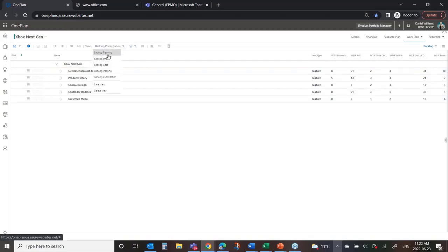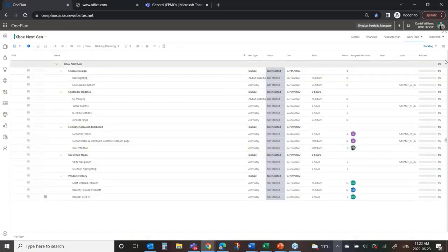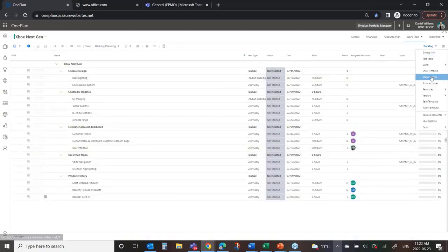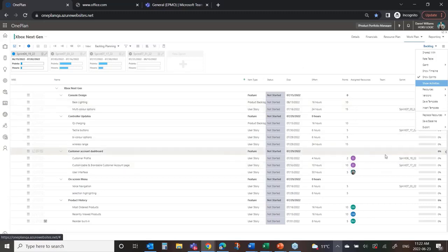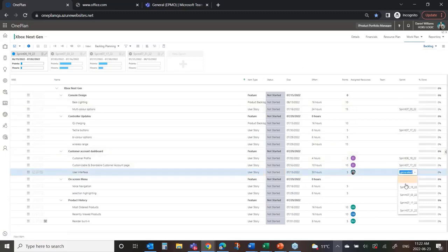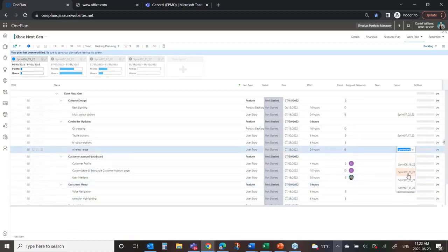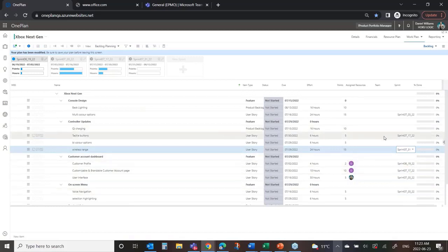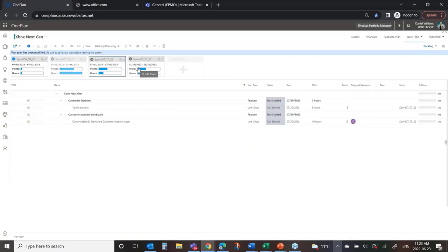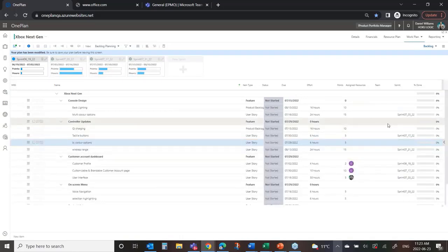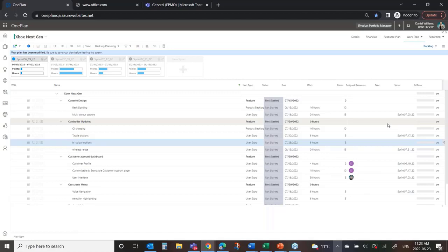So back to my planning, I can now look at all of those capabilities. I'm going to just show my sprints on here. And now I want to plan at the very tactical level, how do these items make it into the sprints that map back to those releases? And so you can see in here I haven't put everything into this particular release. So I could start to align these items to which sprints I want them in and just keep adding them to sprints. You can see as I do that, the sprints are being populated with the items that I'm adding to that particular sprint as I plan this out. And at the start of each release, I would revisit this and decide, has something come into play that we need to add or bump forward? Do we want to revisit our backlog, which is right here on the screen? And what is the next sprint we're going to do? Where are we going to put these key user stories and product backlog items so that we advance the development of the product?